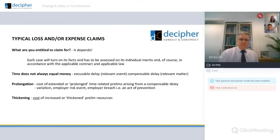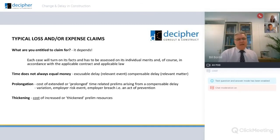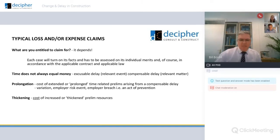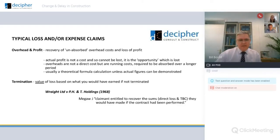Thickening is where prelims are increased to absorb additional work on a project. There's a huge debate at the moment as to whether that should be valued at cost or at value. Thickening is often seen as an additional cost and therefore could be viewed as an additional expense. There is a moot point whether this should be valued as rates or costs.